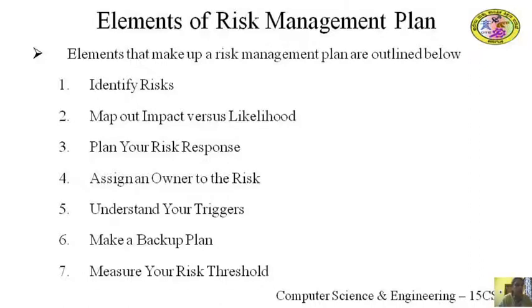Be sure to record what the exact response is and have it approved by all stakeholders before implementation. That way, you can have a record of the issue and the resolution to review once the entire project is finalized. Fifth element is to understand your triggers. This can happen with or without a risk already having impacted your project, especially during project milestones as a means of reviewing project progress.